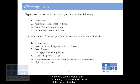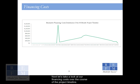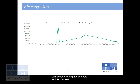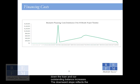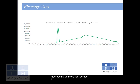Next, let's take a look at our financing costs over the course of the project timeline. The spike in month 19 is a reflection of closing on the construction loan and comprises the origination costs and lender fees. The upward slope is the capitalized interest, which continually increases as we draw down the loan and our outstanding balance increases. The downward slope reflects the fact that we are signing tenants and more rent is coming in, and thus our operating deficit is decreasing as more rent comes in. Finally, our financing costs end up as zero after we repay the construction loan in full.